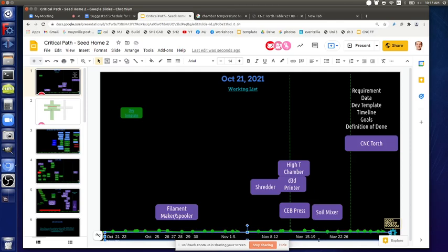Definition of done? Yeah. Okay, we say we're getting a week for the filament maker. We're talking about the tensioning mechanism, and pulling and spooling it as well. Yeah, we should not assign a week to the filament maker, because then it's 95% done as far as the structure goes. The rest is calibrating how to make it flow efficiently. To install it, you reassemble it so that the auger sits on it and then you clean it out. That should take much less than a day, and then have it moving about as good as it was before. At that point, you just need to make trial runs that are not too hot, not risky for getting clogged.